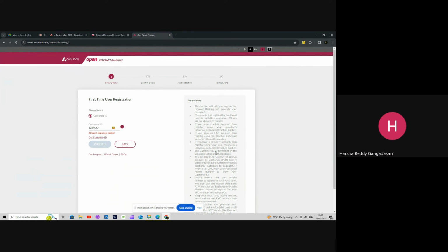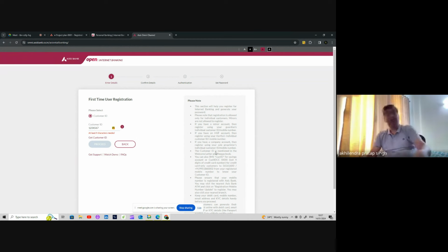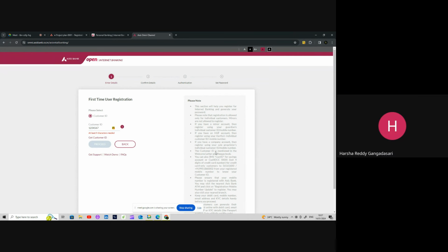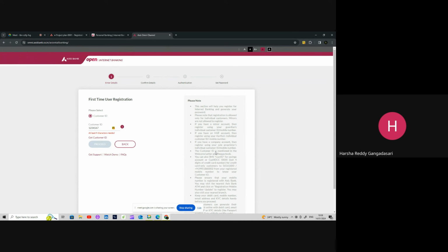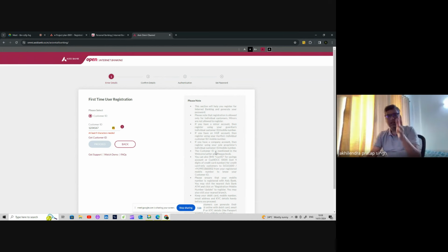So if we want to show the messages through the document to our developers or testers, then how can they get it? I mean, will that be given by them, or we need to? You are going to do everything. Let's say, I did a project where the marketing team was providing all these messages. So I will send a spreadsheet to them, giving them, let's say, 10 conditions. If customer ID is not right, if password is not right, and so on and so forth. They will update that sheet with the messages. They will send it back to me.